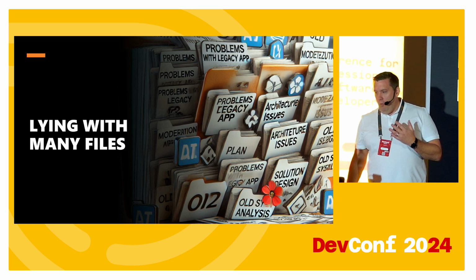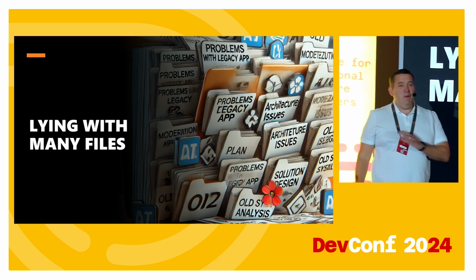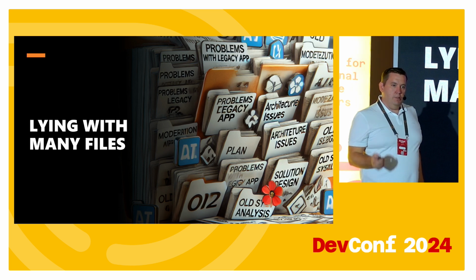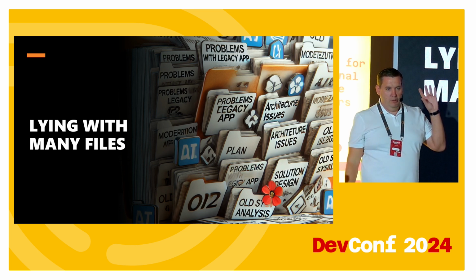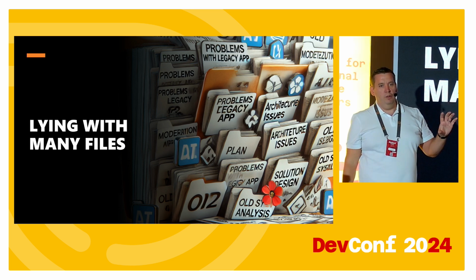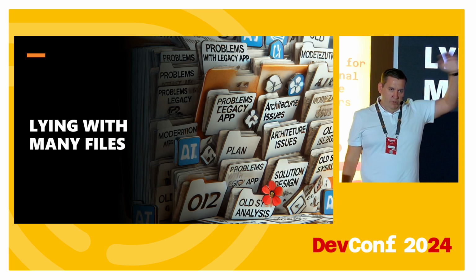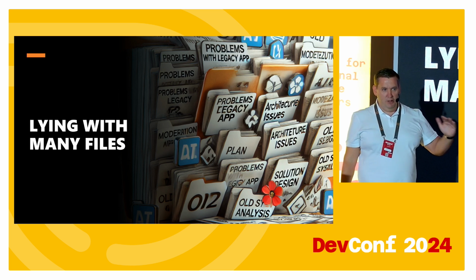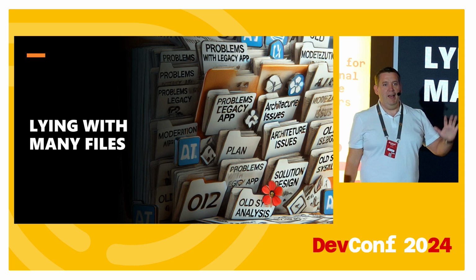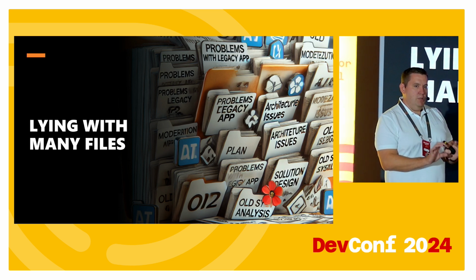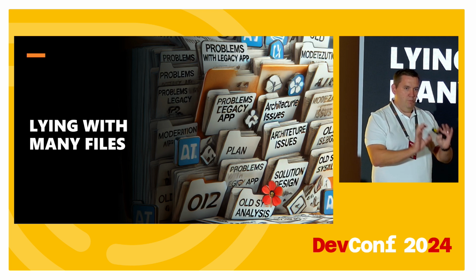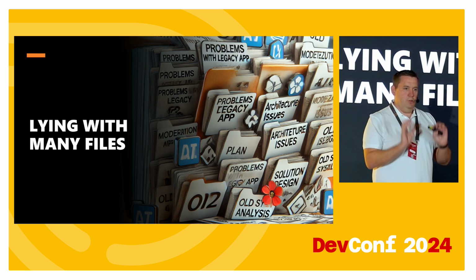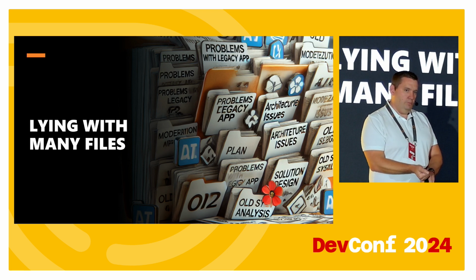So we went into a rather different approach, and this might be a bit too extreme, but it works really well here. We had one single file for each legacy project that we wanted to get rid of. One thing that defined, what are we going to do? What is the issue? What can we do? Every single question, every single risk, every link to every single architectural document had a headline. Every meeting we took the notes in this document, we refactored them to be actions and the things we needed to know. And the project manager got to own this file and refactor it so it was easy to search and had a really good index.